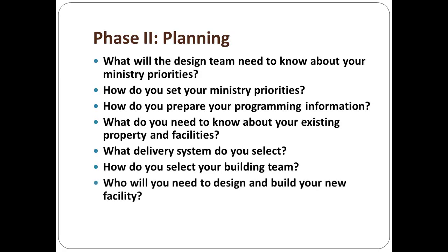Who will you need to design and build your new facility? Well, this depends on the delivery system that you select. If you pick traditional, you're going to pick an architect to design it. You're going to select a general contractor through bidding, and then they're going to build your building. If you're going to use an integrated project delivery system where you bring all the players, all the industry professionals, from architect to builder to engineers to suppliers to interior designer, landscape designers, and others, and church consultants like myself, bring them all together up front to start your project during the planning stage,